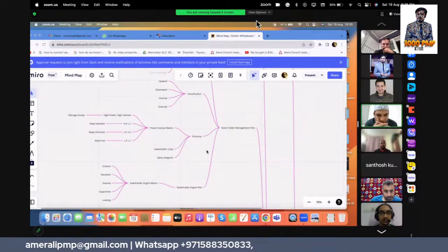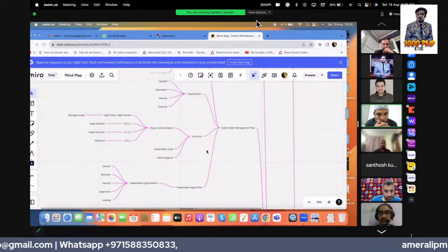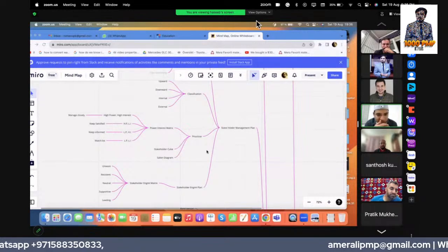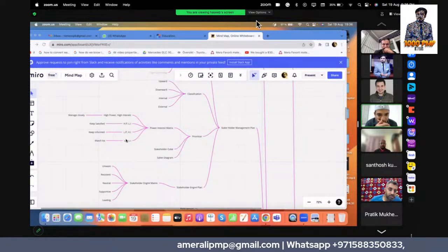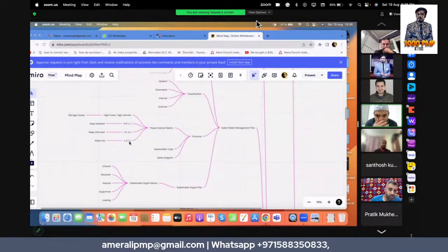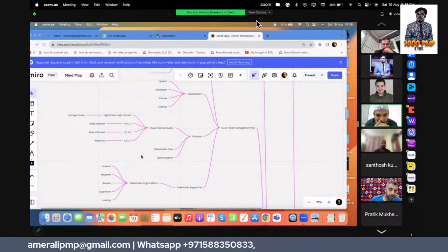Which are again classified: high power and high interest, we manage closely. High power and low interest, we keep satisfied. High power and high interest, keep informed, and low power, low interest, we watch list. We will be in the watch list.